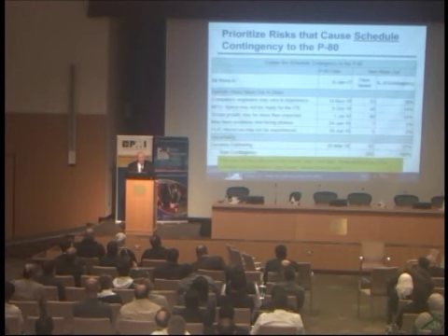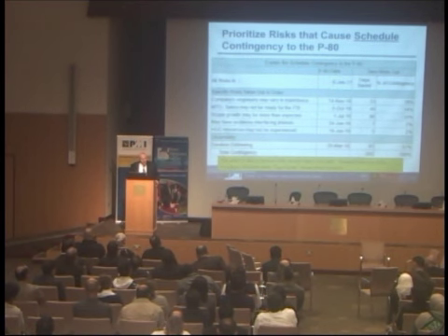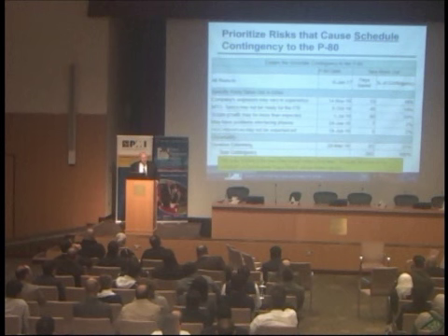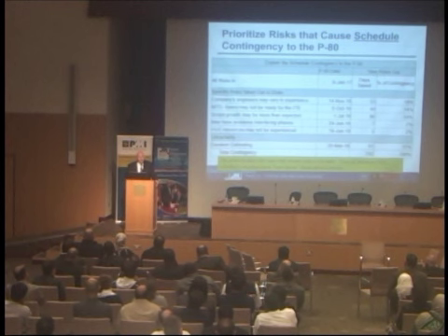And I had one which was a pipeline, gas pipeline, and the compressor was the longest path in the CPM schedule, and they figured it's risky, so they thought the compressor was the riskiest part. But I looked at it, and there was another path called build line pipe and hauling and stringing, clearing and grading and hauling and stringing along the route. Well, by the way, it was in Borneo, and it was in the jungle, and nobody had ever walked the route before, and there were 300 river crossings, and all of a sudden you realize there's a lot of risk in the line pipe creation, which, by the way, was being done by a company who never had done it before. This project's almost done, by the way, so it's ultimately successful.